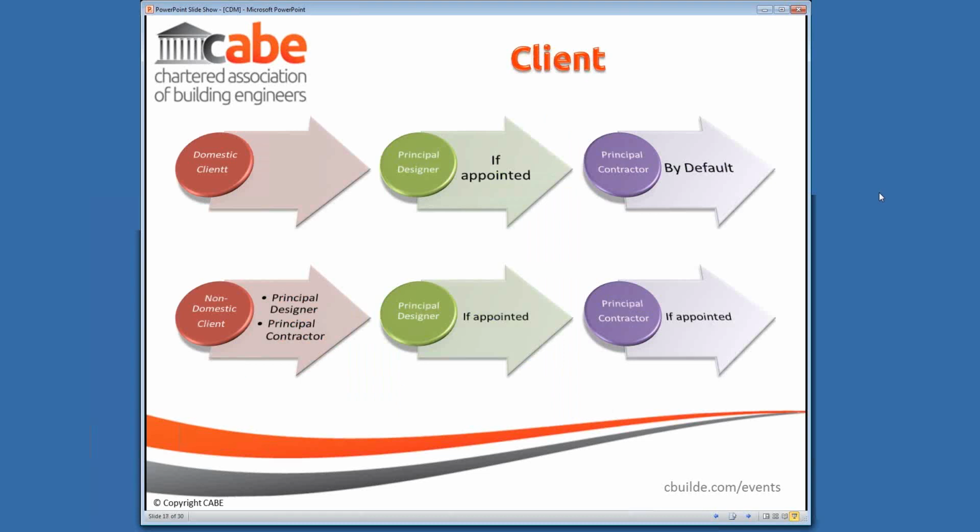In the non-domestic sector, the client will take on a principal designer and a principal contractor, and they will then take on those roles. If the client doesn't engage a principal designer or a principal contractor, then the client is considered to be carrying out those roles.